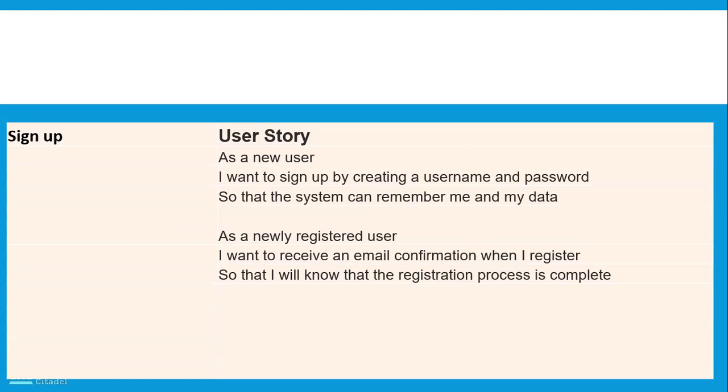Please only follow this strictly. Follow the format strictly, because you can be in a team where they're quite particular about the way the user story should be written. In my current project, we're only working on epics, right? But with our epics, we still use the format for user stories. Now, where I'm going is that they're quite specific. You can't leave anything out. So you'll have as a, I want, so that. Everything is so prescriptive in the project I'm working on that there are certain words you can use, there are certain words you cannot use. But my point is, at the lowest level of things, please stick to that format, okay? As a, I want, so that.